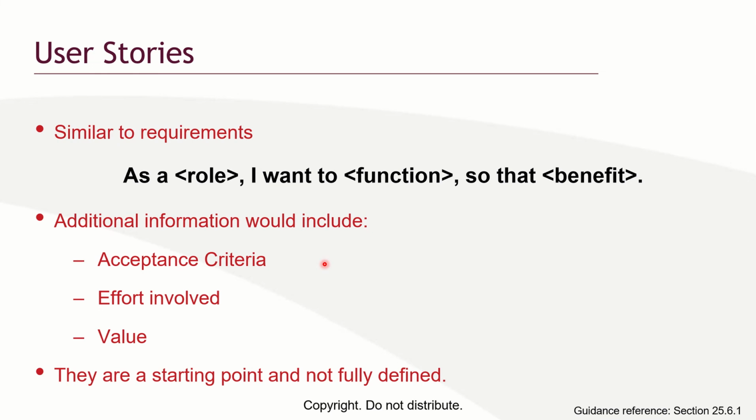And the acceptance criteria, you have to derive it from the benefits. Not all the benefits may be achieved. So you have to say which one are you prioritizing over the other? Which one is it that once we achieve it, you are okay? Then efforts involved: you have to put your time, how long it will take